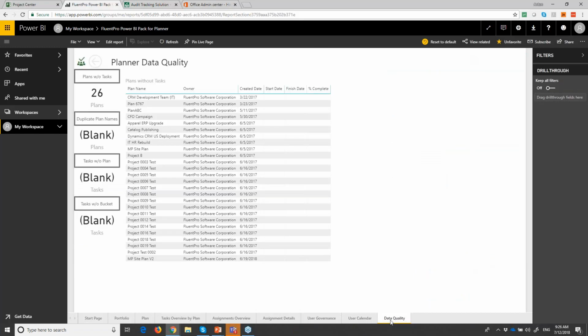Data quality. What we found is that it is critical to have accurate data, because without that accuracy you cannot really build any metrics and make sure that the dates that are committed, the statuses for projects, and the accuracy of that planning are up to date. In many cases, for example in the solutions that we have for Project Online, we found that only about 10% of companies were using baselining for projects. I know that it's not applicable here, but it's still a problem. If you don't have the original plan, if you don't store it, how do you know if there's deviation? How can you make any adjustment, identify the problems, and take corrective actions with your process or approach to project management?